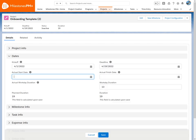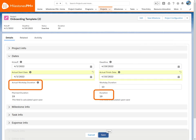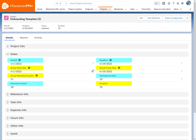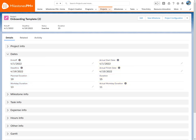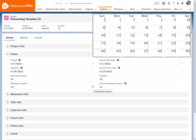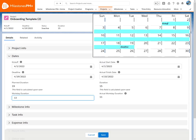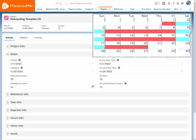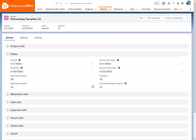For this project, setting the actual dates with an early finish date will also update duration fields. Rearranging the dates into planned and actual columns, fields can update other record details too. For example, if the project is expected to begin on the 1st but take 14 workdays to complete, the deadline changes automatically from the 19th to the 20th, saving time and eliminating miscalculations.